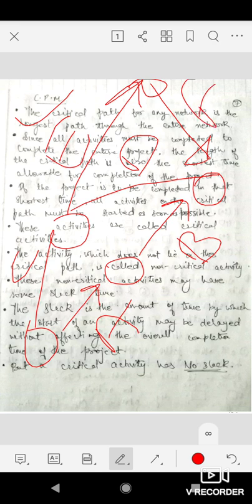There are so many paths like this: A, B, C, D, C, E, F. There are 3 paths. Let us assume that C, E, F is the critical path. So all those activities lying on the C, E, F path are critical activities. If you delay activity C, then you will delay your project. If you delay activity C by 1 day, then your project will be delayed by 1 day.